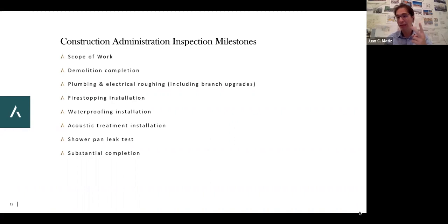The second one that I would flag as a possible one would be something like, which we've had to do many times, which is putting a through wall unit in a building, let's say, or a window underneath a window, having to put, let's say, a small angle or a lintel that's really for an AC unit or a split system or some sort of mechanical system. Structurally, technically, that's an inspection that one needs to make sure that the angle is properly laid out, that it's overlapping on the edges properly, that it's not going to collapse, that it's not going to fall. And that's another kind of inspection. But most renovations have those kinds of things and the fireproofing ones.